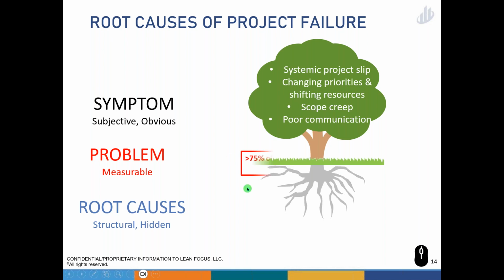And so the problem that comes out is we wind up with a lot of late projects and a lot of projects that come out half done, which is really just another way of saying a late project. I know in the software world, a lot of people are very attuned to, hey, it's not that my project is late, it's just that I push a story into the next release. Sorry, your project is late. We're not delivering features to the customer that we planned to, and that's what defines late. We can't get a project partway done and release it and say it's not late.